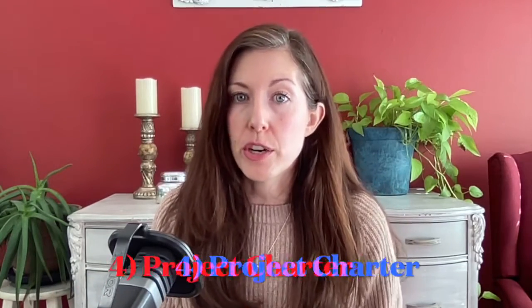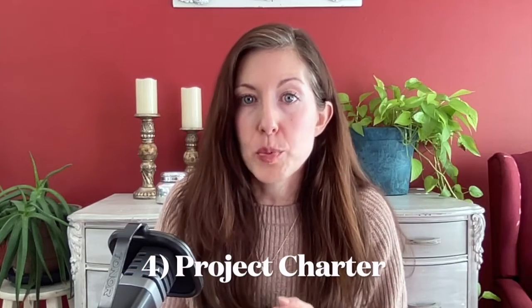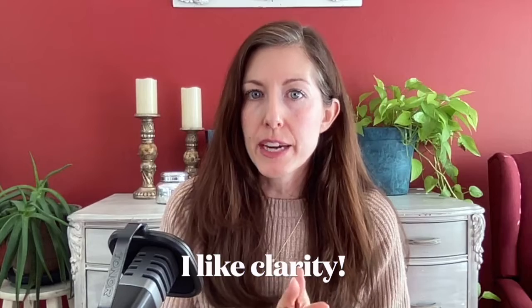Now, once the statement of work is signed off, you're ready to kick off, I do also create a project charter, typically a one-page project charter, and this is for the internal team. This is a document that I will use in the project kickoff to walk us through the project. Again, walk us through the expectations, what everyone's role is, what does success mean? Because if you haven't figured out yet, I like to be extra clear, especially if I am a fractional person